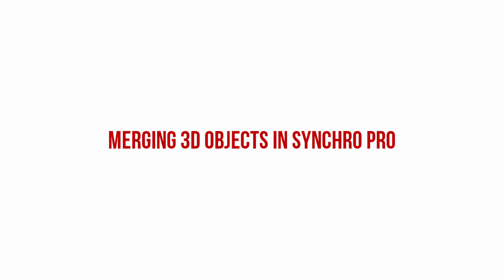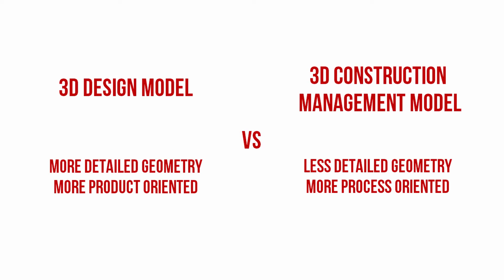This video demonstrates how you can merge 3D objects in Synchro Pro. This feature allows you to turn your detailed 3D design model into a lighter version that is more suitable for the 4D management process.